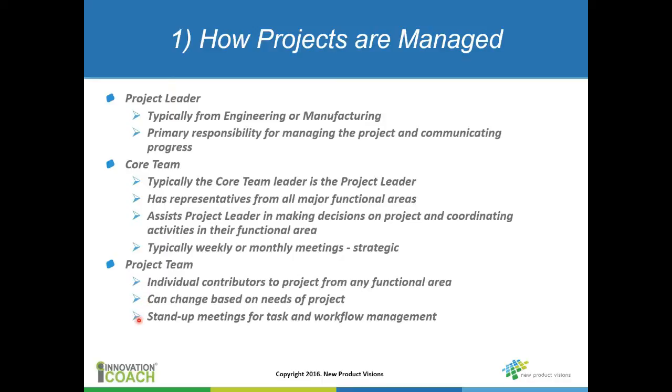And really within the project team, you can use the concept of this lean project management tool that we talked about in the last webinar, which focuses on stand-up meetings and the visual project board for really the task and workflow management. So it's really at the project team level and that lean tool that you're going to be focused on task management. And the core team meetings really shouldn't be task oriented. They really should be more focused on strategic direction.